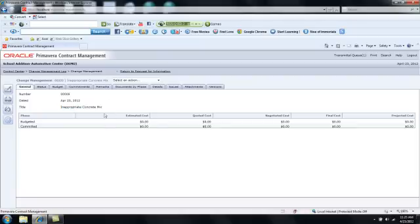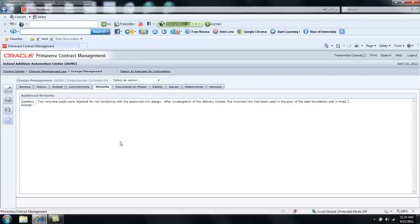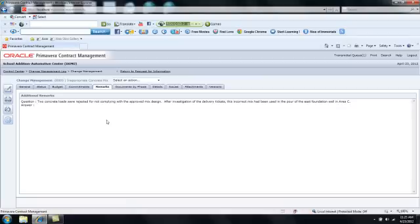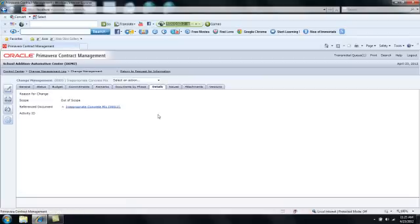Additionally, if I click on the Remarks tab, I'll notice that the question and the answer from the RFI will both be posted to the change management document on remarks. If I go to the Details tab, I'll see a link back to that RFI.